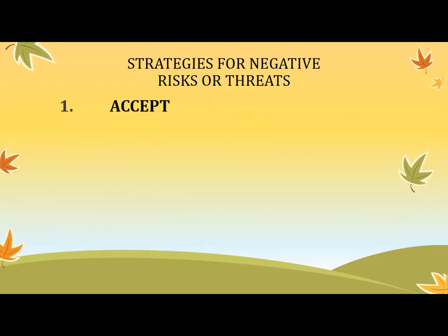You see, after it happens, it's too late to prepare, right? After the risk happens, it's happened. And that's why we call this accept. And unfortunately, some people mix up accept with mitigate. Mitigate is taking action before the risk happens. Accept is at best saying, if the risk happens, I'll have an active strategy to do that. You see the difference? So that's accept. Let's take a look at the next one.